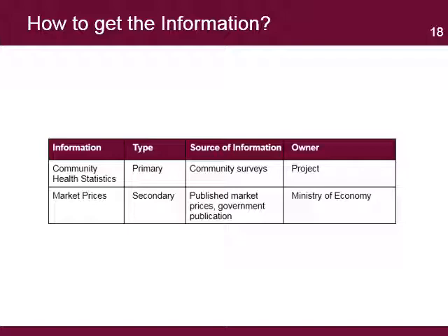Once the project team has located and identified the owners of the information, it needs to find out what it needs to do to gain access to it. This needs to be balanced with the cost and effort needed to get information. By organizing information sources with the type of information, a project can identify the gaps and redundancies in the information required by the project. The table can also be used to classify information sources by relevance, usefulness, accuracy, credibility, and significance.